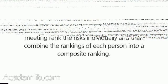In the case of purely qualitative evaluations, judgment can be used to rank the risks. There are several methods for doing this. One of the easiest is to have each person in a meeting rank the risks individually and then combine the rankings of each person into a composite ranking. This will give an overall consensus ranking of the risks.